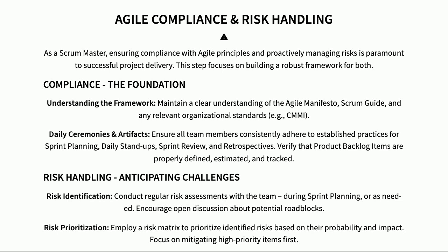Now, let's move on to risk handling. We need to anticipate potential problems before they derail the project. We do this by working with the team to identify risks, prioritize them based on how likely and impactful they are, and then come up with concrete plans to deal with those issues, assigning ownership and making sure everyone is aware of what's going on.